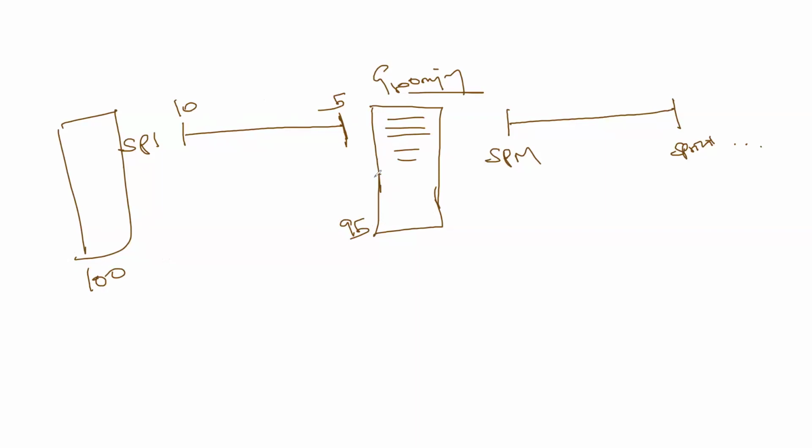90 here, but 5 remaining from this. And maybe some new features got requested. So we are adding 10 more features. It becomes 105. And it is prioritized. Based on the new understanding, when we gave the demo, when we discussed with the stakeholders during the sprint, we got some ideas. Accordingly, we prioritize. All these are known as product backlog grooming. So once a sprint is completed, before the next one, we will identify which product backlog items we will prioritize for the next sprint.